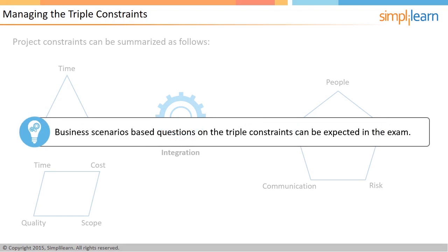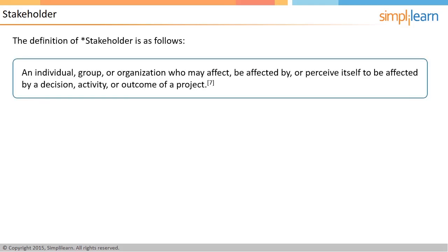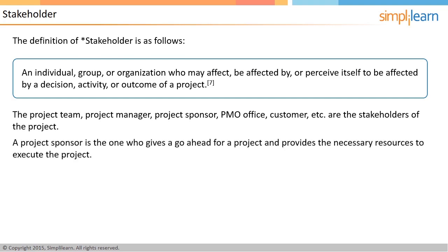A stakeholder can be defined as one whose interests may positively or negatively be affected, or perceived to be affected, by the decision, activity, or outcome of the project. The project team, project manager, project sponsor, PMO office, and customer are all stakeholders of the project. A project sponsor is the one who gives a go-ahead for a project and provides the necessary resources to execute it. The head of projects in the organization who provides a green signal to start a project is the project sponsor, and they are usually placed high up in the organizational hierarchy.